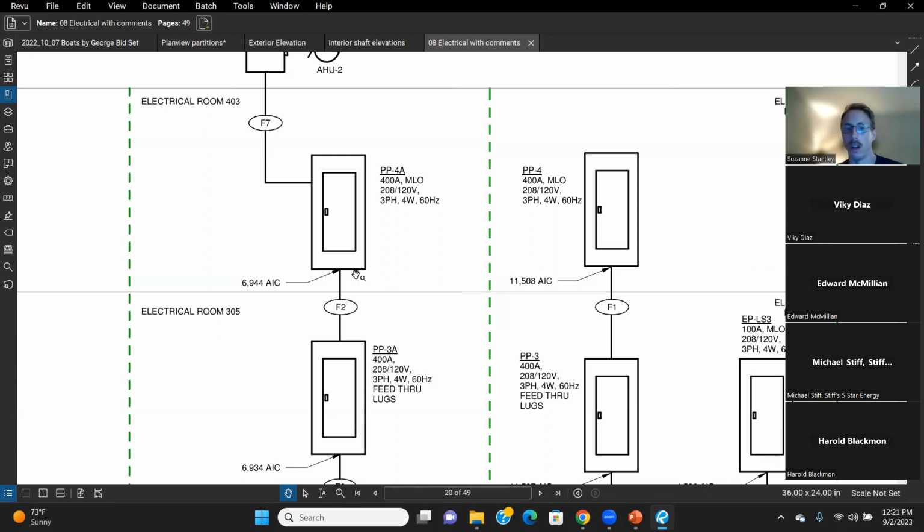You need this sheet to tell you what your conduit and cable is, and then you need to go back to your plan view to get at least an estimated distance between this panel, in electrical room 305, and this panel on the upper floor. Room 403 may be not only a floor above, but on the other side of the building. We don't know unless we're also checking our plan view. But from this, we know what's between them. That's what it's showing here.